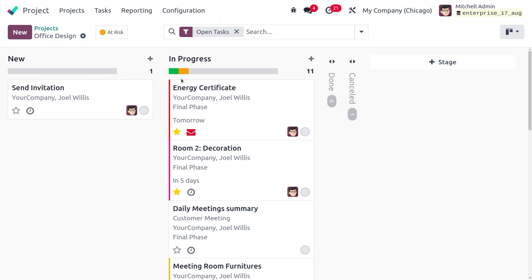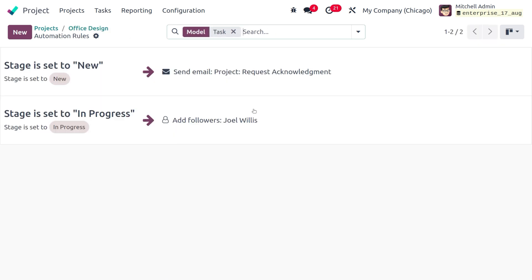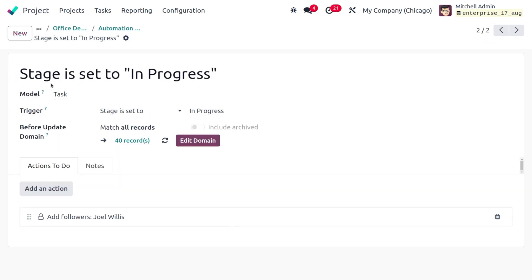The next rule we are going to set up is: whenever a task is moved from the New stage into the In Progress stage, the customer should be added as a follower. Go to the Settings of the In Progress stage and under Automations, set the rule. The model is Task, and the trigger fires when the task enters the In Progress stage.